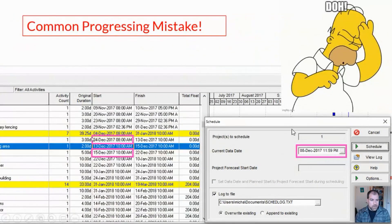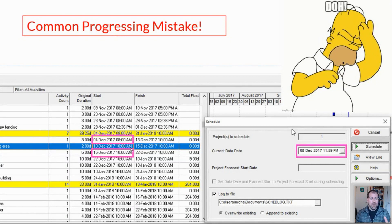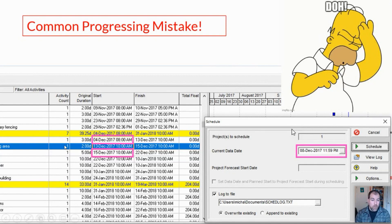Here's what happens. If we are not paying attention to the time — what I mean is the clock that's next to a date — this can really have ripple effects and cause all sorts of problems in your progress scene. I have been bitten by this on more than one occasion. By default, P6 doesn't show this time, and it's common for this time to not be set properly at the start of the day and the end of the day.